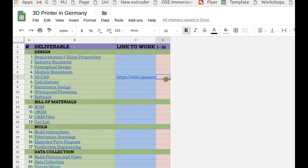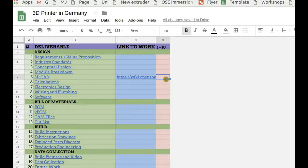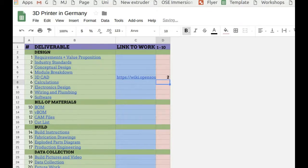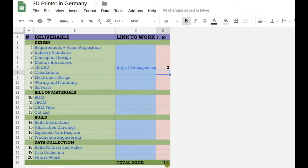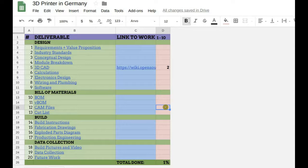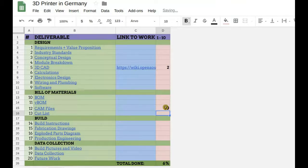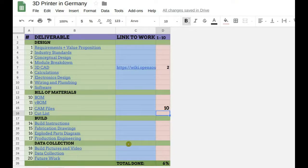And now here, depending on the state of completion, put 0 through 10. Say you just started the CAD. You might have done some work. Say the level of completion is 2. And what happens at the very bottom is it gets tallied up for whatever completion you have. It automatically updates the status of completion.